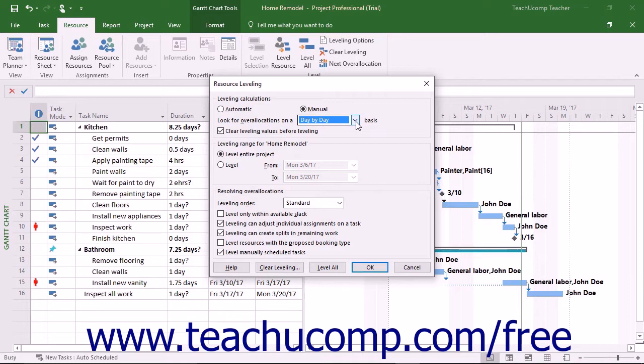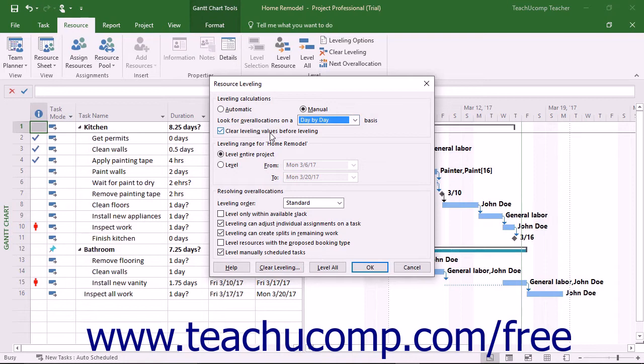Next, decide whether or not to remove any leveling adjustments before applying the new leveling. To clear old leveling adjustments before applying new leveling adjustments, leave the Clear Leveling Values Before Leveling checkbox checked.